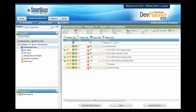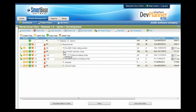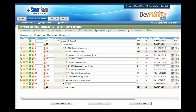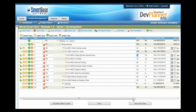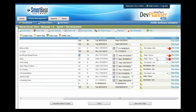It all starts here in the project management area. Simply add a new plan using our plan wizard, and then you can add tasks and assign work to your team members. As they work each day, they'll log their time worked and their hours remaining. You can create hierarchies of tasks and decompose those into individual items with estimates, and then you can also see person by person how everyone is allocated.